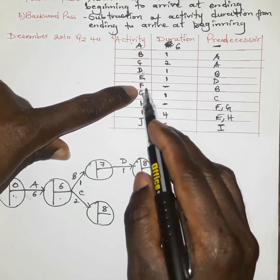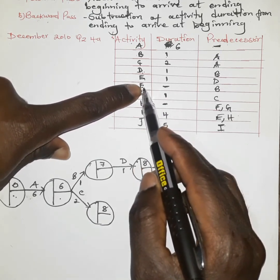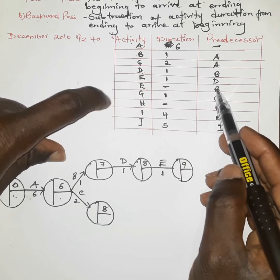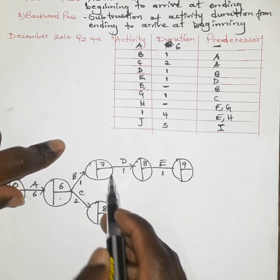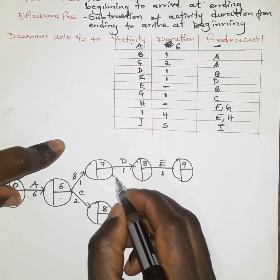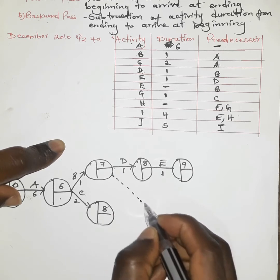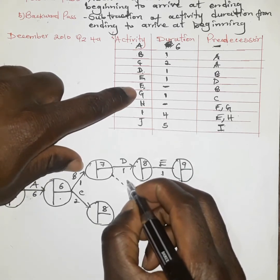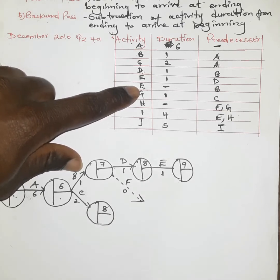We have activity F, which is a dummy activity. This dummy activity begins as soon as B is completed. We use dotted lines to illustrate that a particular activity is a dummy activity because it does not consume any resources. Activity F consumes zero time, and we indicate it that way.